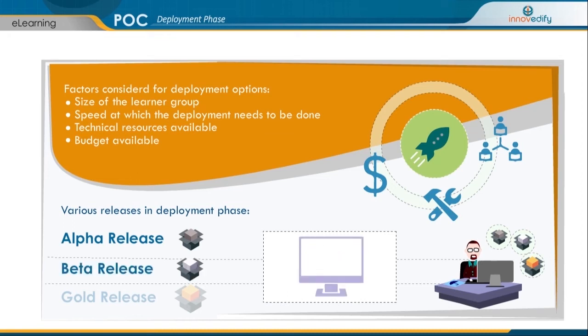Beta release. Based on the results of Alpha release, we scale up the e-learning course. If there has been a large-scale change, we start with Alpha release again. Once approved, we proceed for full-scale deployment.